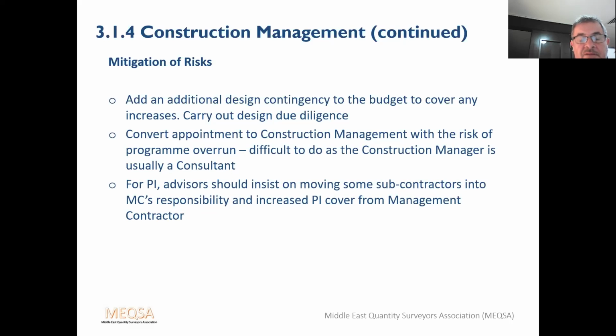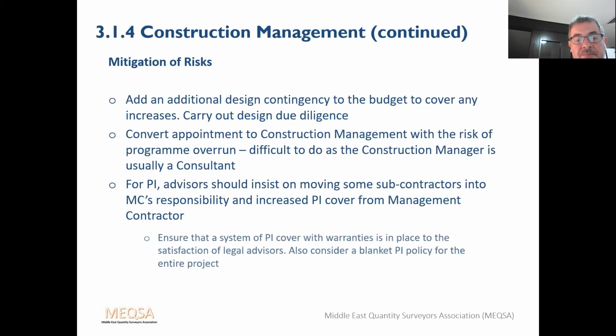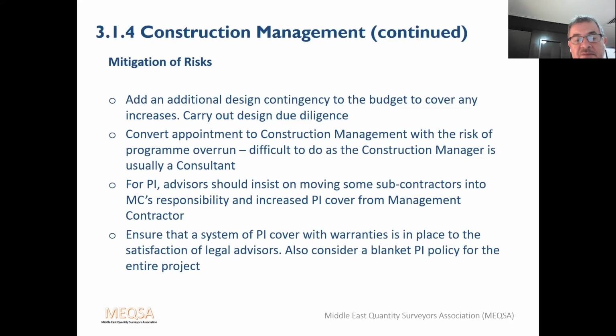For PI, advisors should insist on moving some subcontractors into the main contractor's responsibility and increased PI cover from the management contractor. Should ensure that a system of PI cover along with warranties is in place to the satisfaction of the legal advisors. Also consider a blanket PI policy for the entire project.